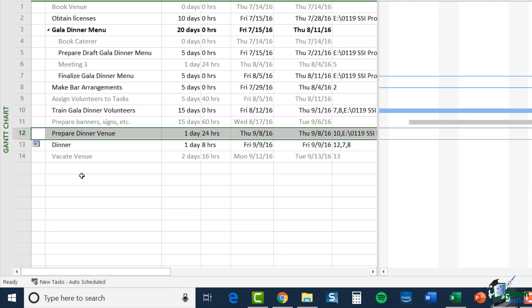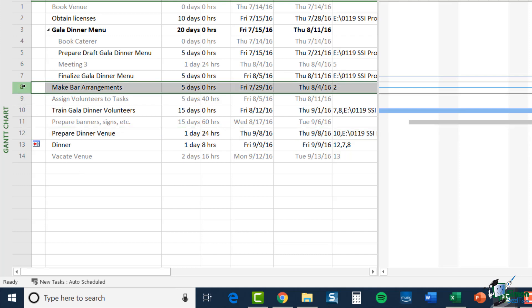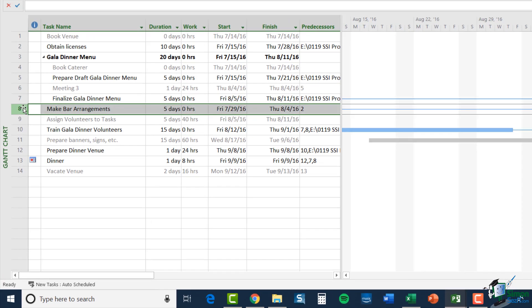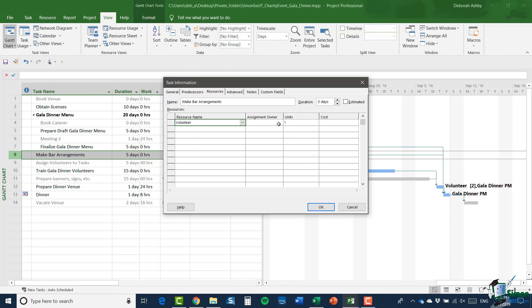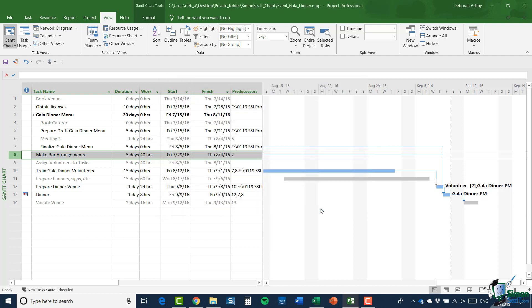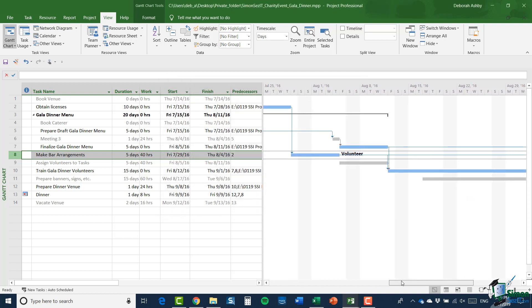And then the other thing we might want to say is could I actually assign an additional resource here? So, let's suppose that what I wanted to do was to assign the volunteer that I've just freed up to make bar arrangements. So, let's do that. I'm going to double click. I'm going to select volunteer, one unit and click on OK. And you can see I now have one volunteer assigned to task A to make bar arrangements.